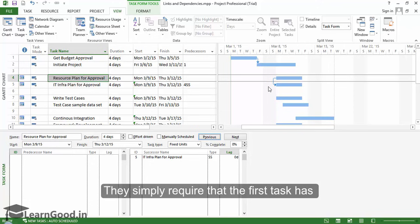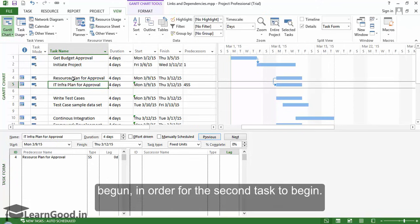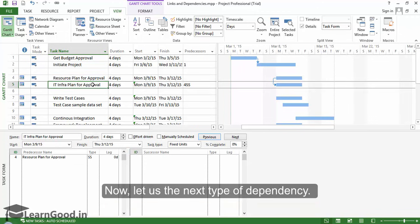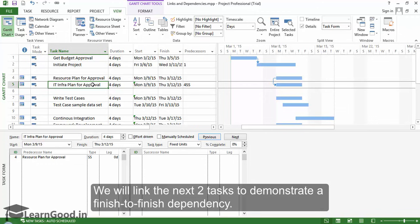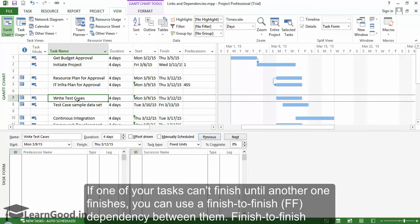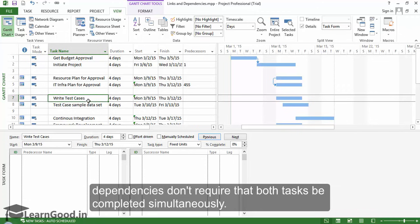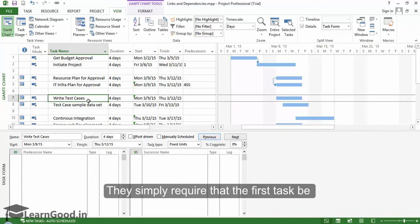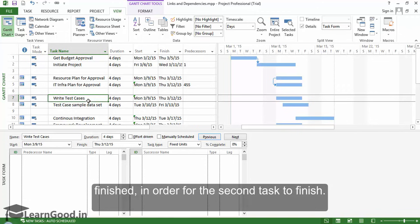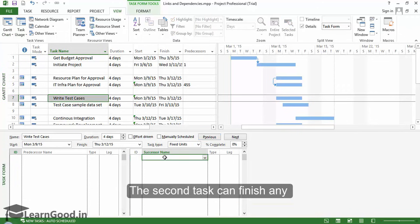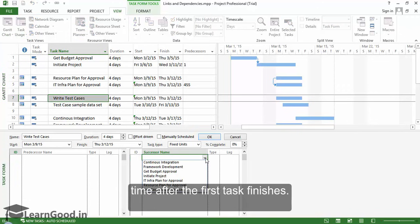Now let us see the next type of dependency. We will link the next two tasks to demonstrate a Finish to Finish dependency. If one of your tasks can't finish until another one finishes, you can use a Finish to Finish dependency between them. Finish to Finish dependencies don't require that both tasks be completed simultaneously. They simply require that the first task be finished in order for the second task to finish. The second task can finish any time after the first task finishes.